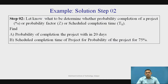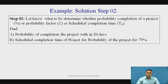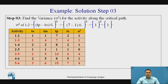In the first step, we constructed the normal network diagram, performed the forward pass to define project duration, performed the backward pass, and identified critical and non-critical activities using floats. In the second step, we identify what is expected: finding the probability of completion within 20 days, and finding the scheduled completion time for a probability of 75 percent.